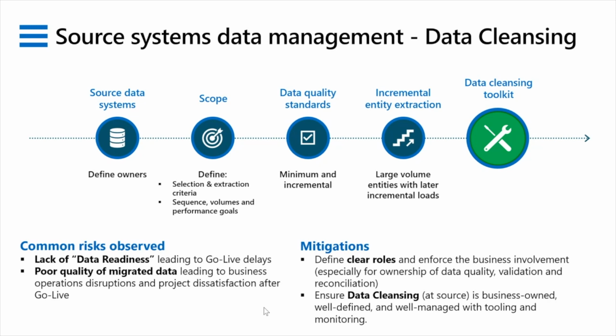Take that for large volume entities that you have some means of being able to do incremental load so that the extract of a very large amount of data from the source system does not become a performance hindrance at the final cutover. That you're not sitting there waiting 8 hours while you're extracting 1 million records from a legacy system. Have some definition of what you need to do if the data extraction requirement from the source system is very large. Maybe you do it in pieces or you do it in some other way.